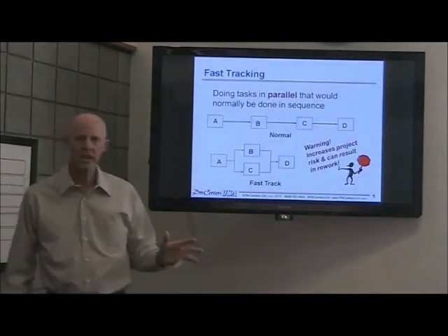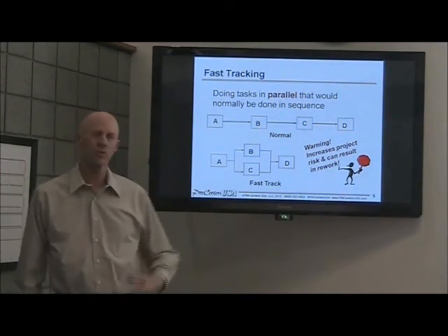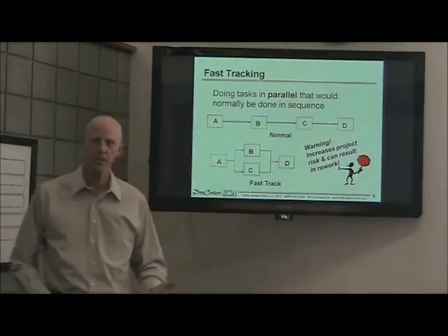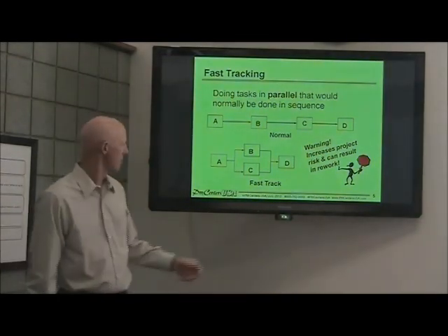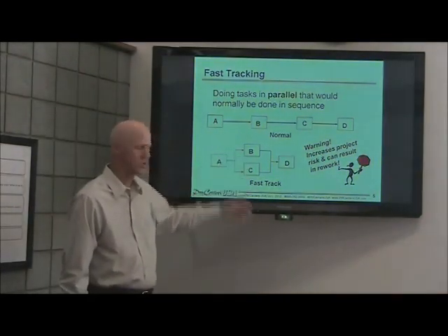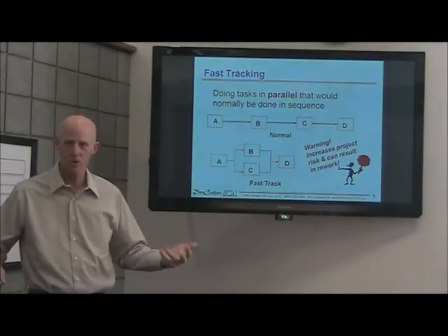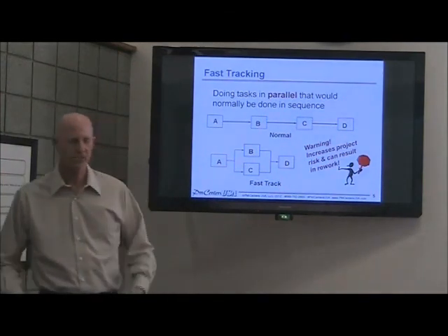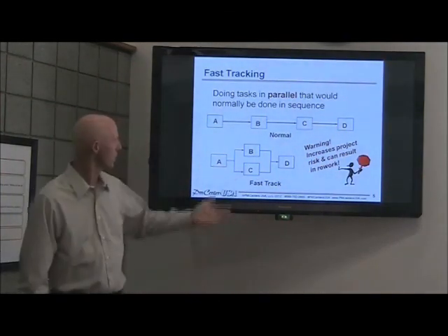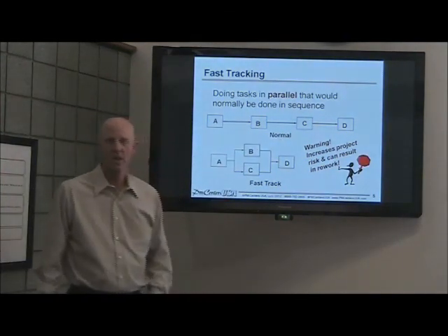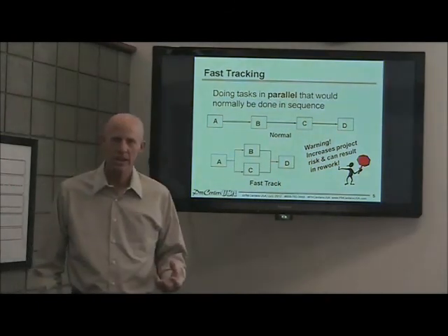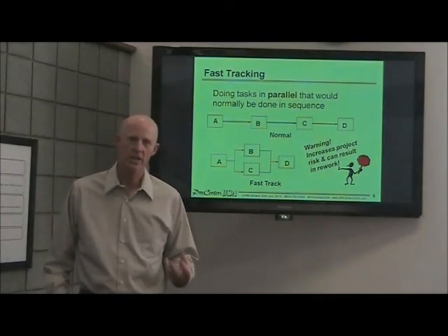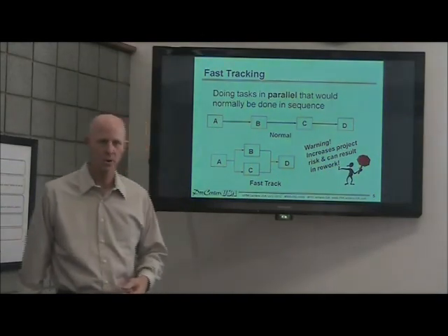Now the caution here is, number one, it can increase project risk because, again, coordination issues, and maybe there's some stuff that they need to share, and maybe the sharing won't happen as well as it should. And it can result in rework. Again, if things don't get done correctly, because that's why you were doing it sequentially originally. So there are some risks and potential rework issues that can occur when you do things in parallel.